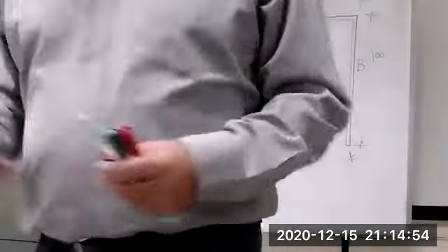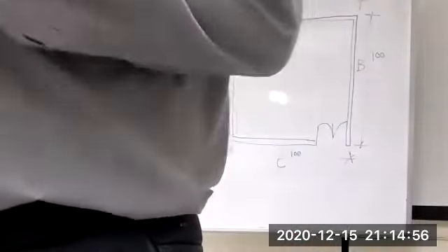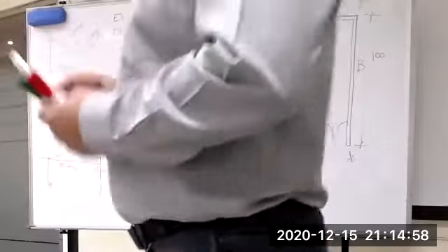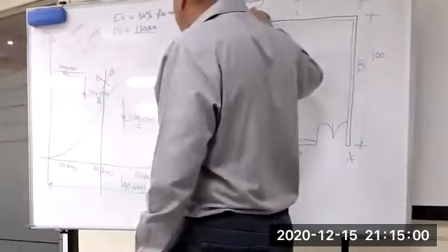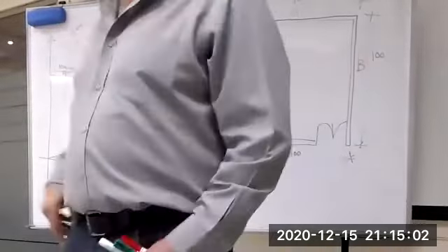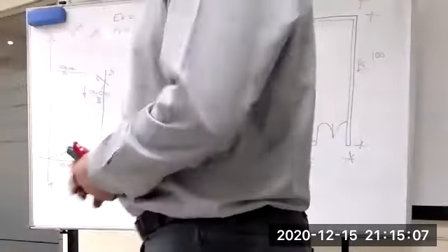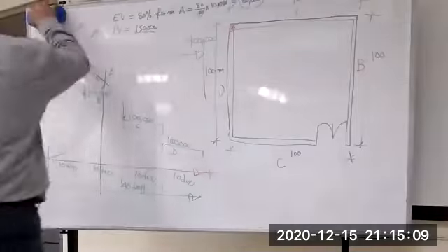From these two figures, what do you think? I have achievement 80, but planned 150. That means I am behind schedule. How did you know it? By what we call the schedule performance indicator.